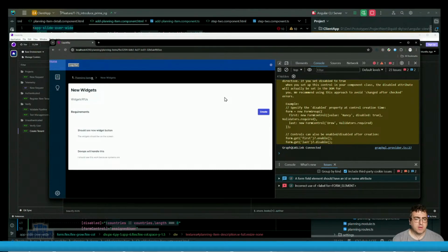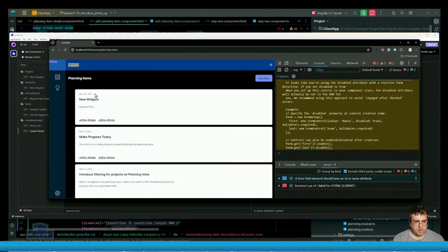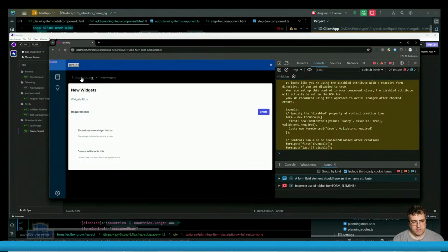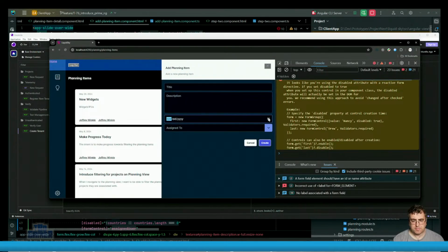So I have this concept of a review date, and a review date is a mandatory date that you set when you actually add the item. And this is a date, it'll have to be a date in the future. It's not validated yet. But basically you'll say, okay, well, this has to be reviewed by June 6th. So by the time that comes around, this screen's about to change as well. I'm overhauling the UI with all new controls. But the idea will be you come into your planning items on June 6th, and you're basically presented with, by the way, these items are up for review. You need to review these or set their dates back, etc.